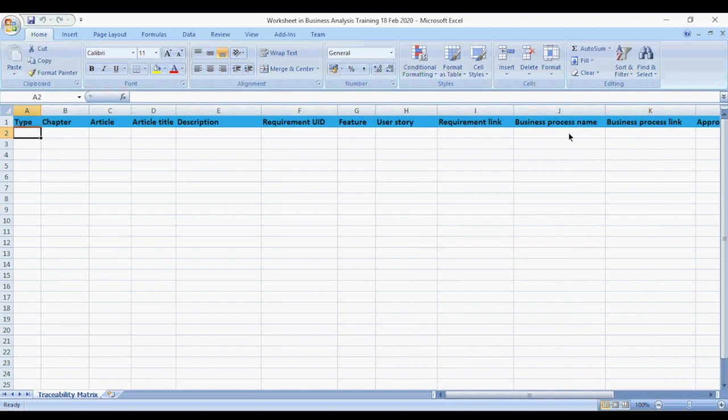It's just to ensure that all the requirements they put out there, you've actually met, because you want to put a check in place, like a checklist, saying has everything been met? Let's say the data protection project or regulation says there are 36 requirements. Then you may put all the 36 requirements here. Then you want to see, have you met all 36? Which ones are missing? Which of the requirements have you not met? Have we met 26? Okay, that means we've done 75% of the project. It's just for you to trace all your requirements to your deliverables and to ensure that everything has been met.